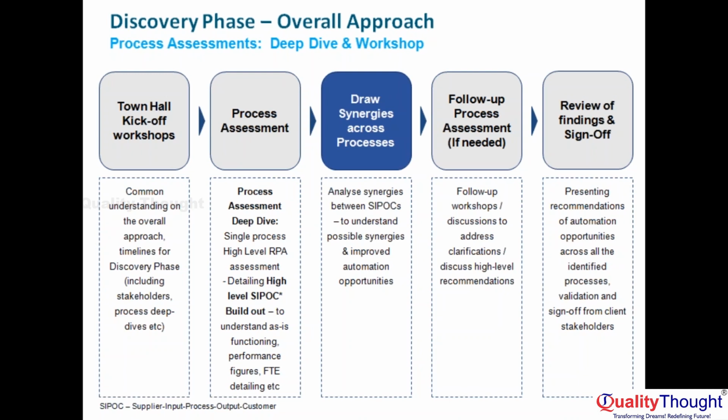Then follow up the process assessment. If you need more clarification, or it has to be signed off, you have to take proper approvals. Then only we go to design. Then only your script development. So these are the activities under the discovery phase.